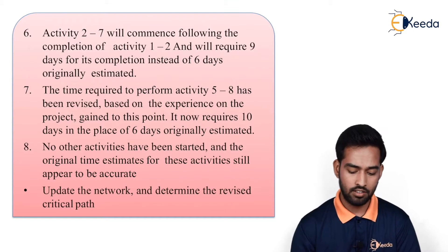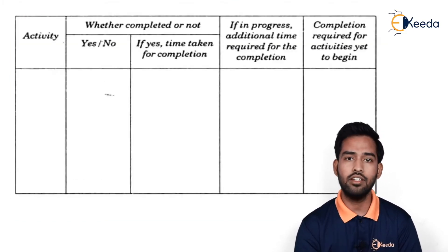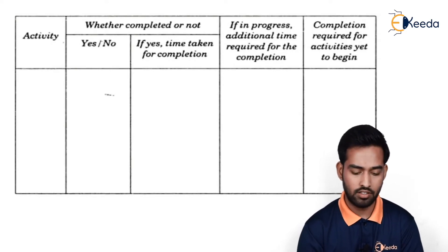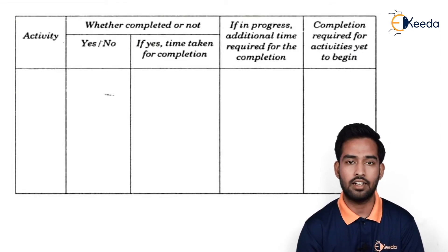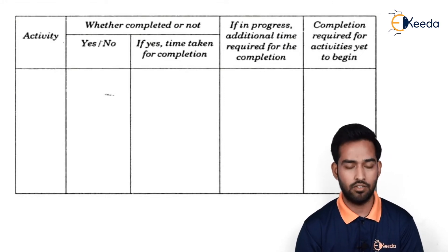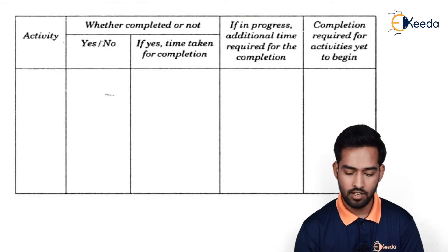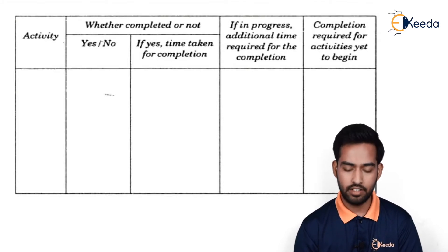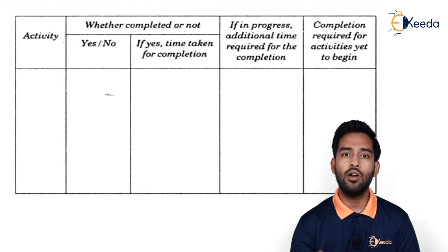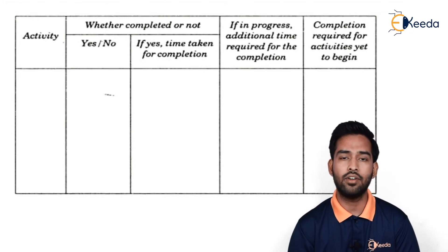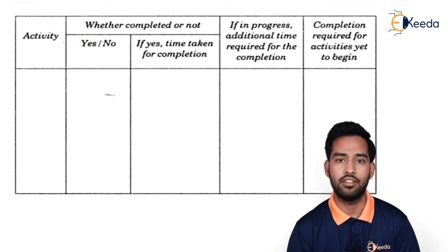Update the network and determine the revised critical path. After this, we have to update the network and fill all this information in the chart, in which we can see each activity, whether it is completed or not. For example, activities 1-4 and 1-3 are completed, so we write 'yes.' If activities are not complete, then they are in progress — and if they are in progress, how much more time they will require must be mentioned, as well as the time required for activities yet to begin. In this video, we have seen how to update a network, the process of updating, when to update it, and what information and data we require to update a network.